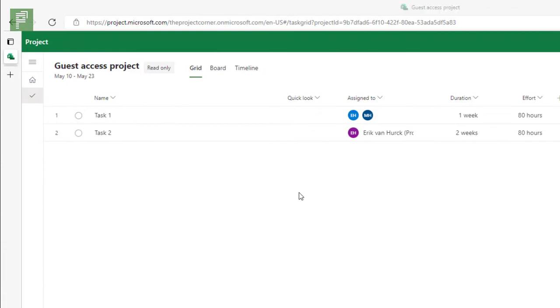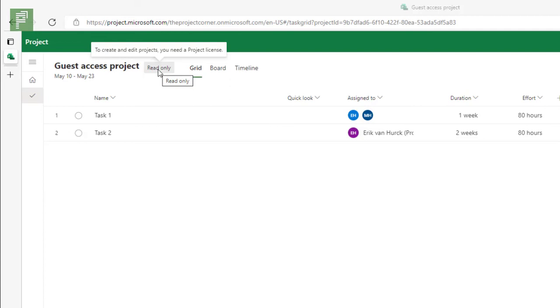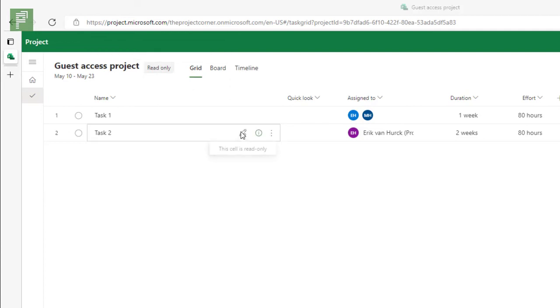Let's click on it. And because I don't have any project licenses, this is a read only project for me. If you want the external resource to actually partake in the project and actually update the project themselves, you will need to require, you will need to add a P1 license or P3 or P5 license to that external resource within your own tenant. So that means that if the external resource already has a project license externally at their own tenant, that doesn't apply to this external shared resource project. There's a nice little check mark telling me that this cell is read only.